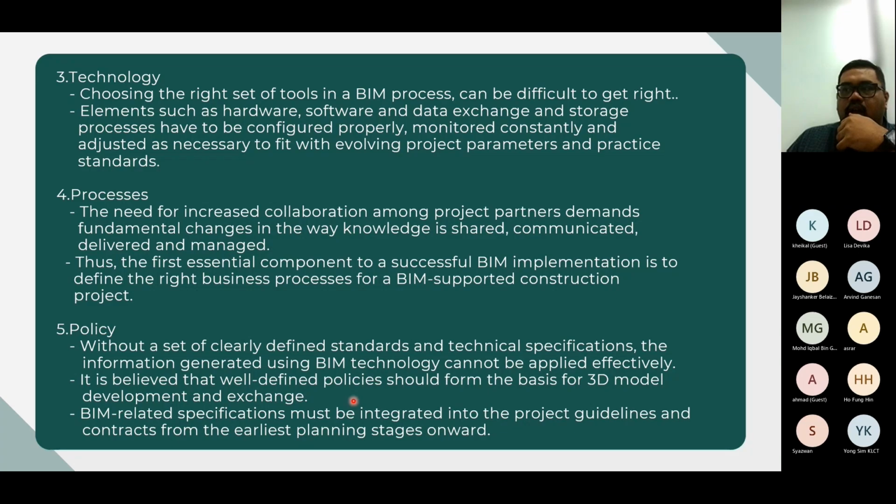The beauty of ISO 19650 is that it includes a clause on contracts. The contract clause really helps to force the stakeholders to come on board on BIM implementation. I think that's the only way to make sure they deliver everything.